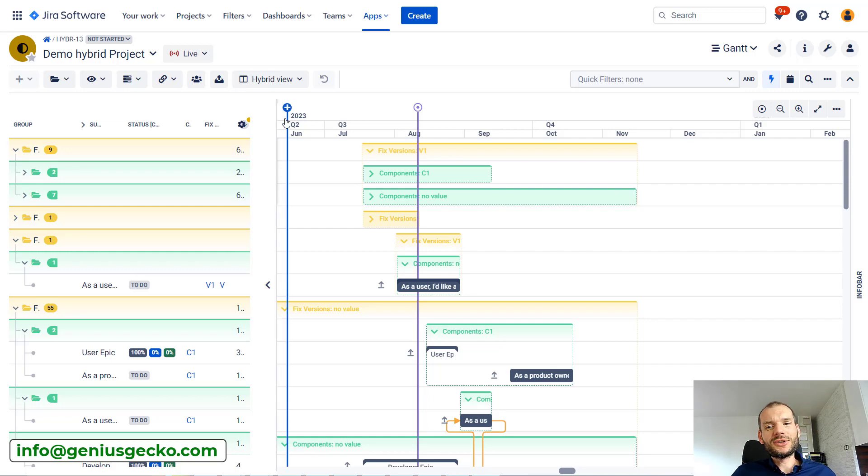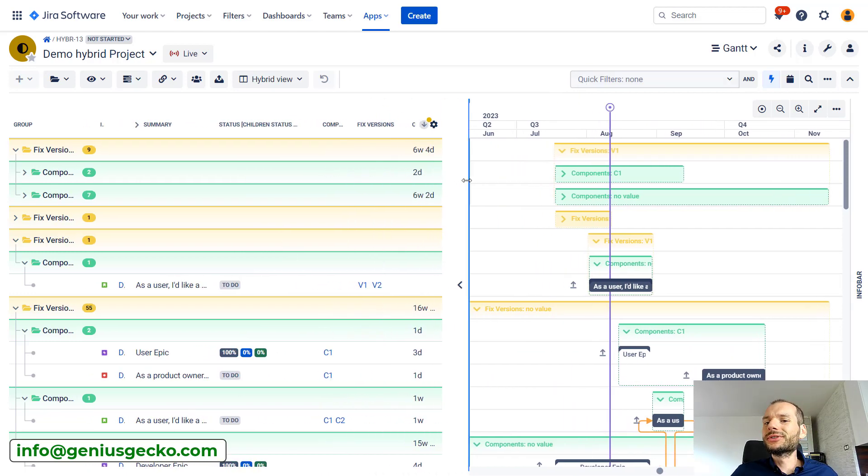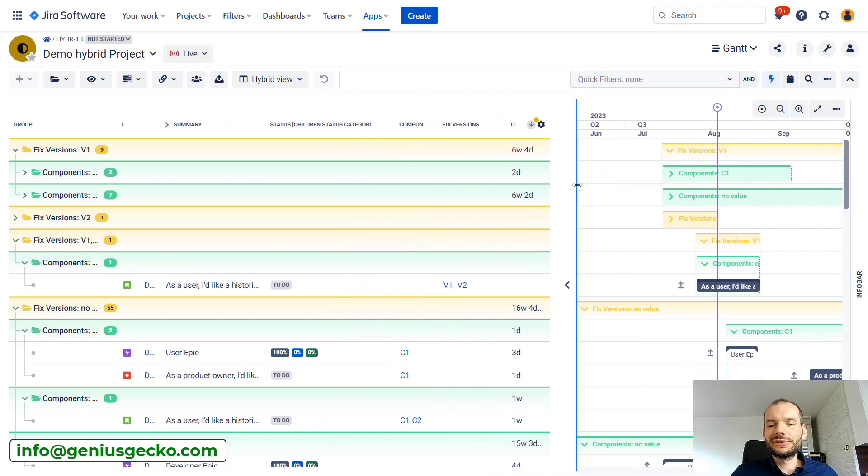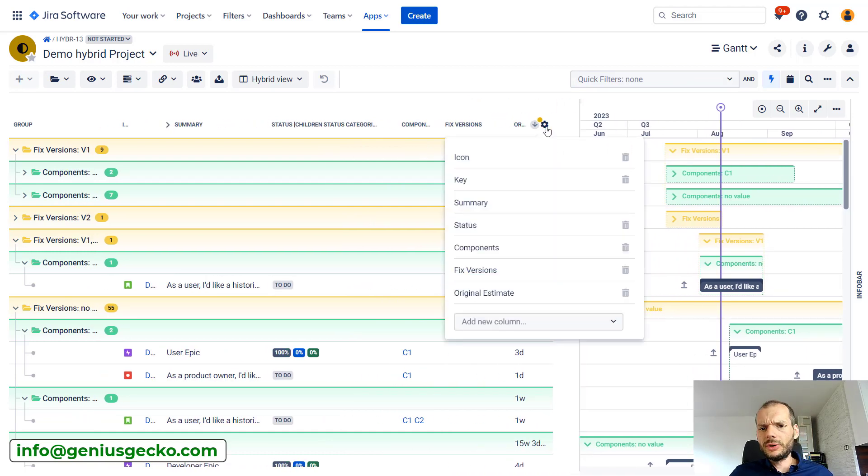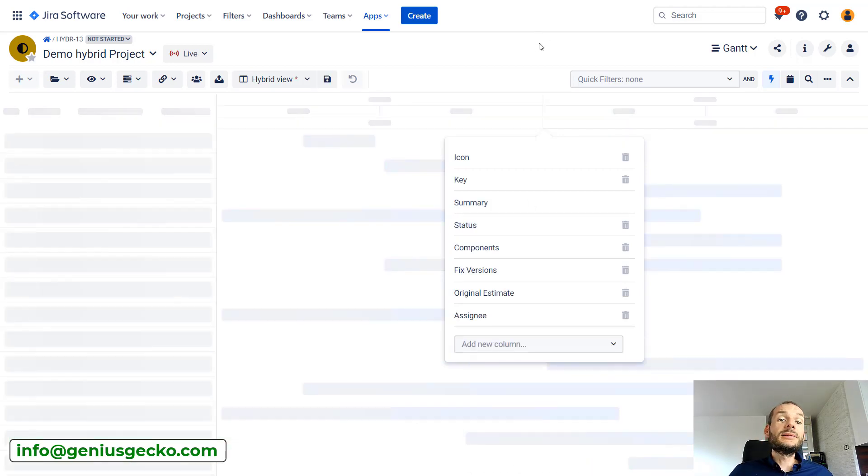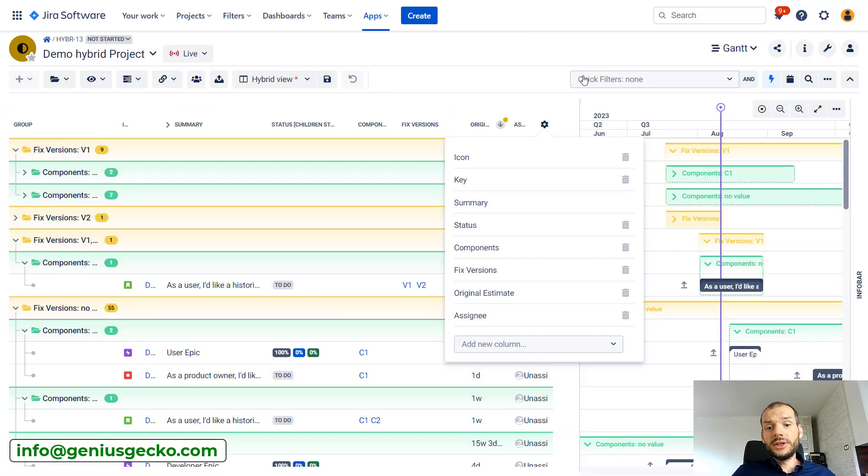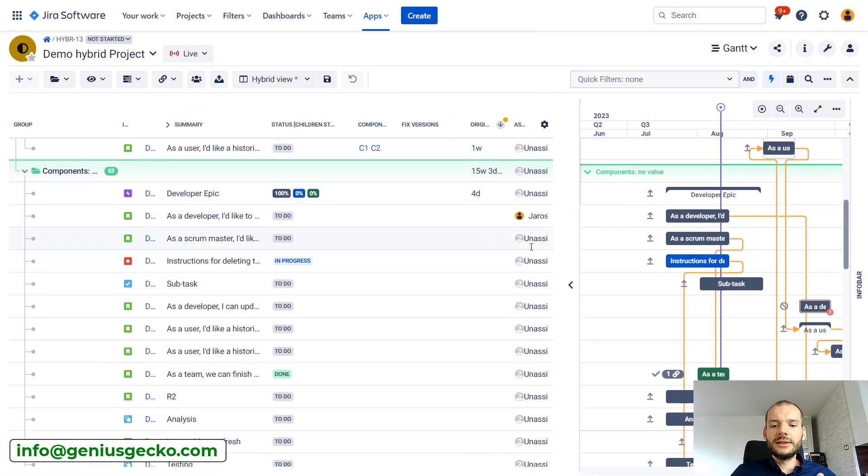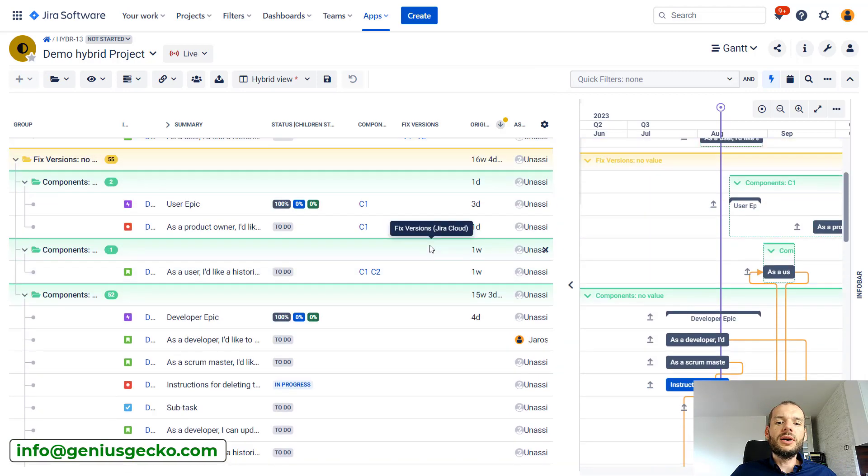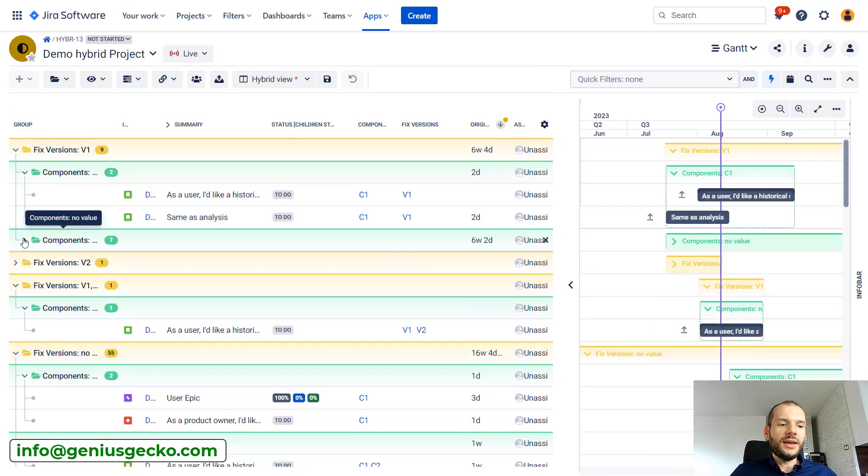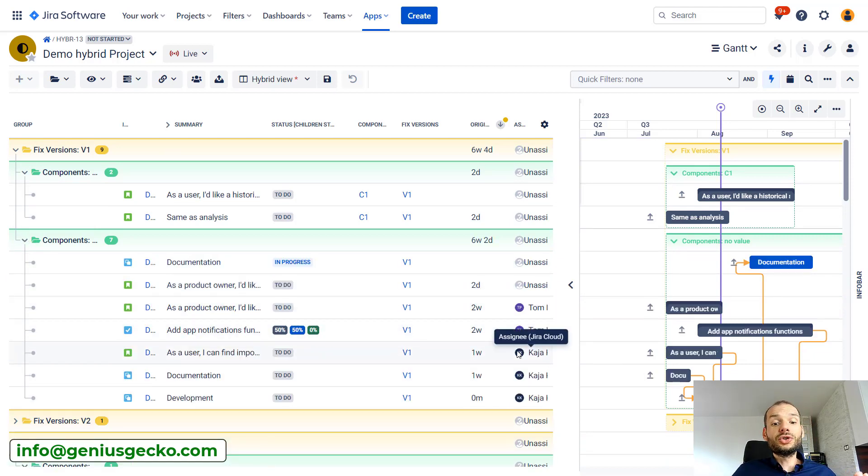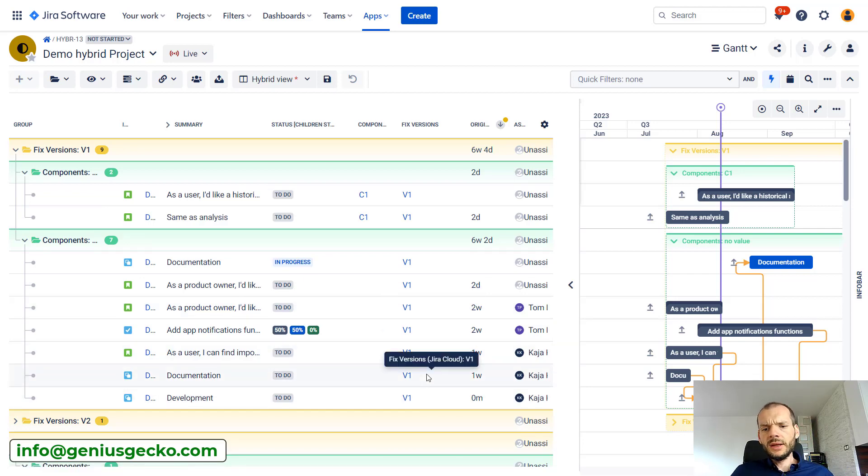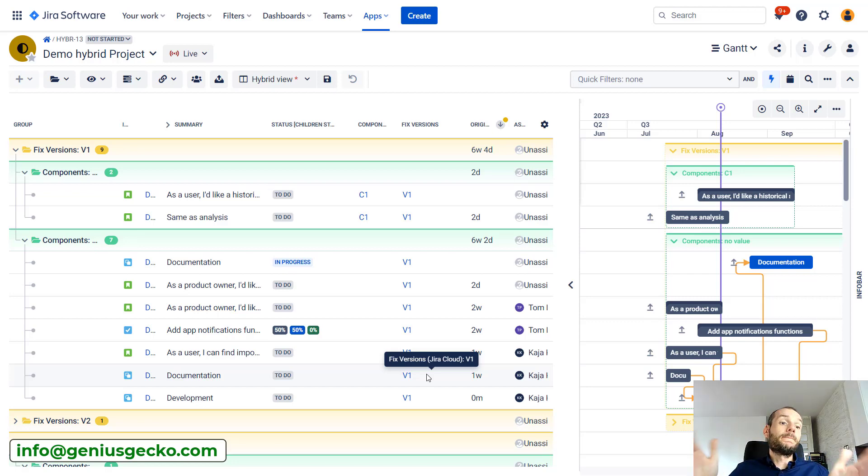You may think that we have pretty good quick filters, why not just use them for searches? And yes, you should use quick filters first, but there are cases where they are not sufficient. I will add assignee over here. Let's imagine the situation where you want to make a pretty complex search, something like: show me all the tasks that are assigned to Tom or Kaya that are assigned to fixed version one. So basically you would need to have a search like task has to be assigned to Tom or Kaya and to fixed version one.